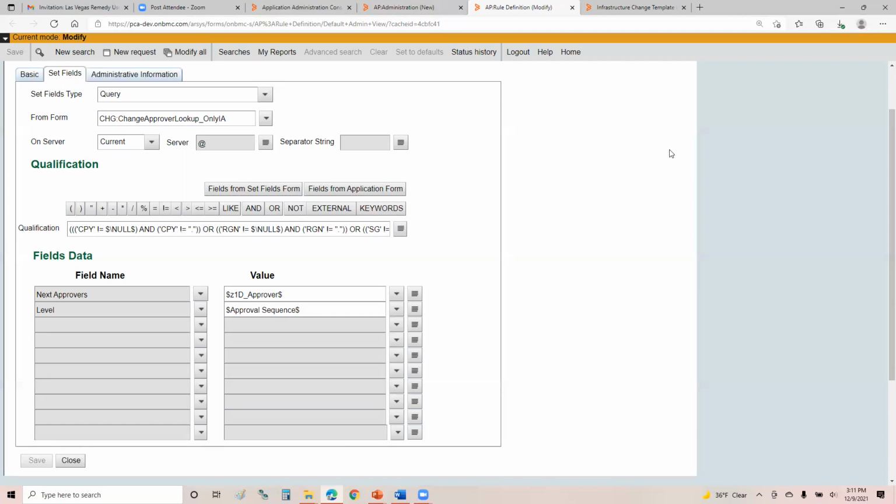Well, when you're presenting a report as the CAB facilitator to the CAB, what's going to be the biggest discussion that they're going to have? It's going to be those changes that are up for approval. So I would always start off with, let's get it out of the way first. What changes have been completed? All the changes. How many standard changes? Here's this list of the standard changes. Nobody really complains about it, but I give them a list. Here's the active standard changes. Within a couple of minutes, you're done. Now you get into each individual change that's ready for them to approve.